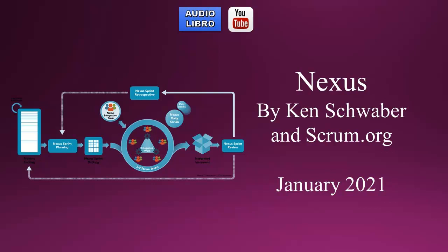The product backlog must be decomposed so that dependencies are transparent, identified across teams, and removed or minimized. Product backlog items pass through different levels of decomposition, from very large and vague requests to actionable work that a single Scrum team could deliver inside a sprint.